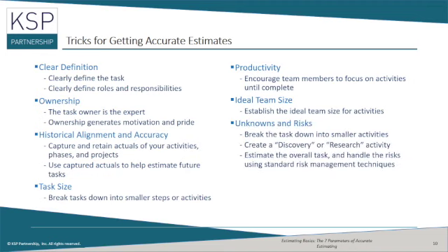And finally, handling unknowns and risks. First, break the task down into more detailed activities. You'll discover that the risky areas are actually less than you first thought.